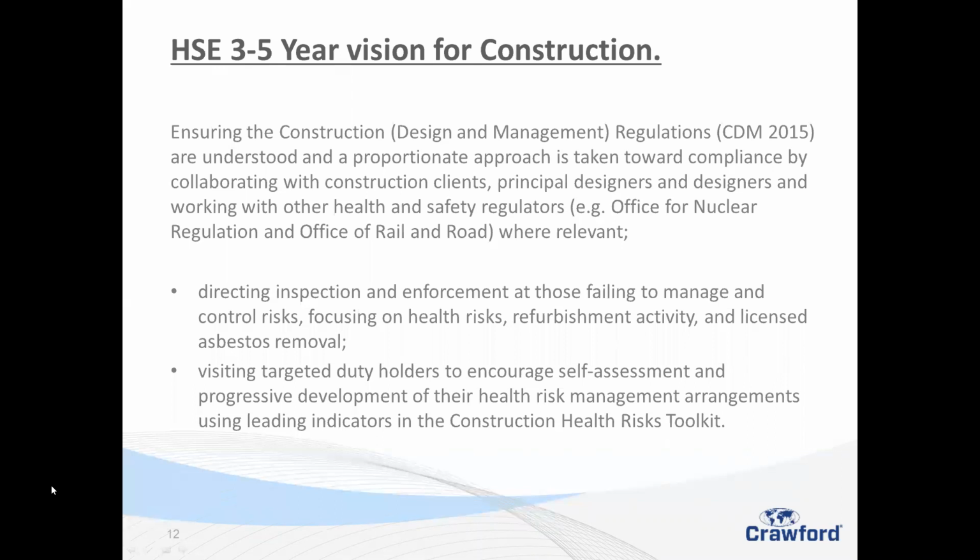Right. Exterior designer. Okay, there will be designers. You will need, again, we've got to look towards who's employing who. If there's more than one contractor there, which I should think so, given my minor knowledge of theatres, I should think there's 2, maybe 3 other people involved there that aren't employed directly by the theatres. So we'll be looking at a full hierarchy from client, principal designer, principal contractor and contractors. I will see the guys actually creating the design as either being employed by the principal contractor or being a separate contractor.